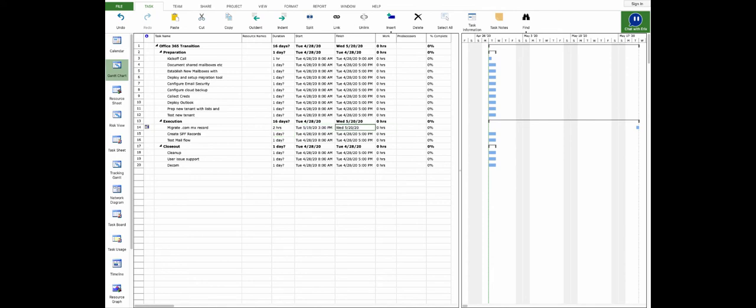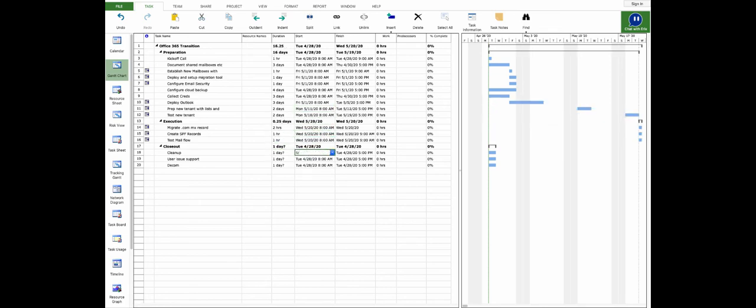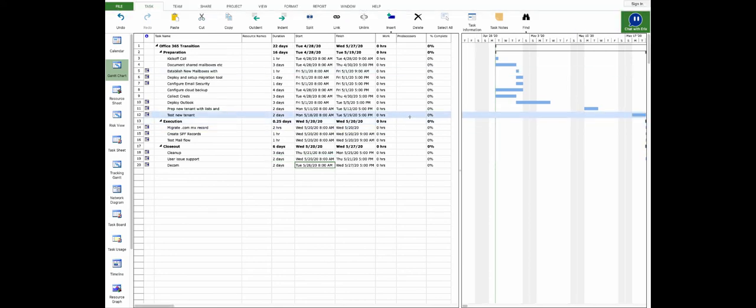This is a task that's going to take us a couple hours. As you can see here, by updating this task, I've not only updated the end date for the phase, but our top level project has also moved out. So we'll take a little time here to update the rest of these dates and round out our project. Items here we want to add.